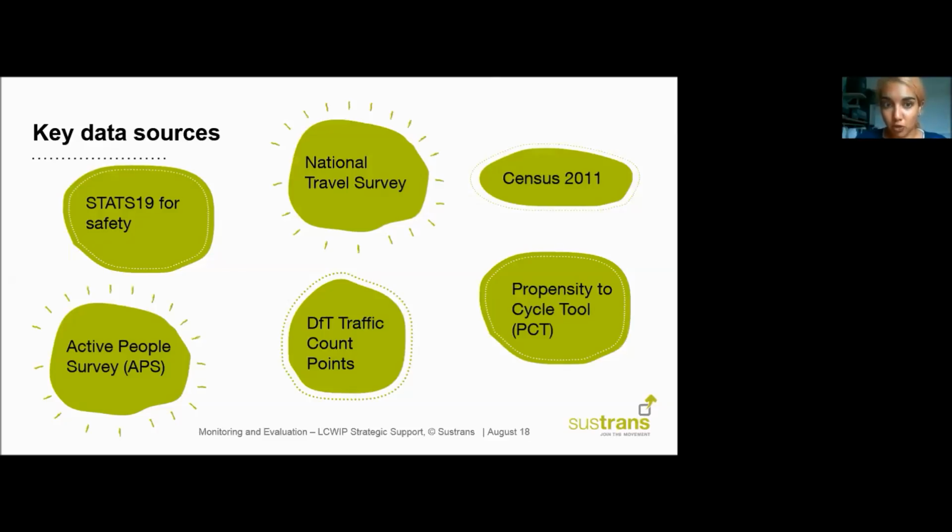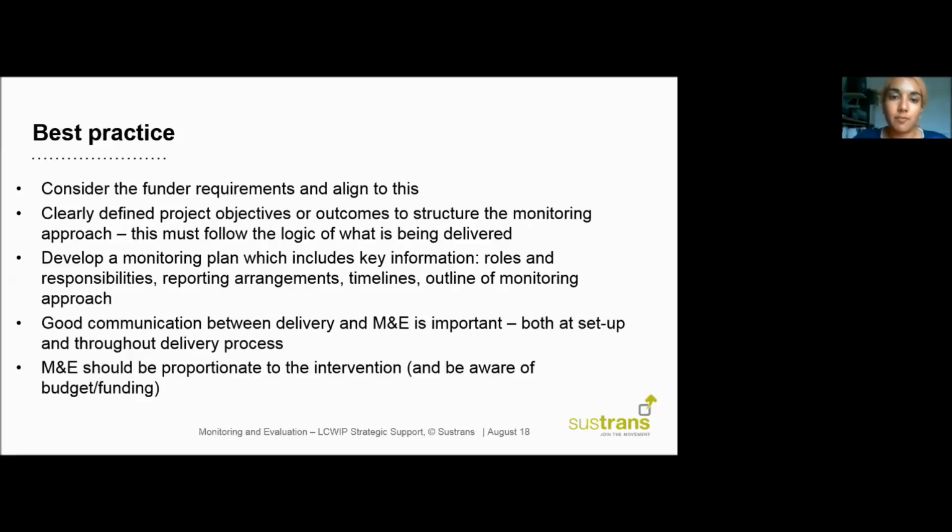In terms of best practice when designing a monitoring and evaluation approach, there are a few pointers. As I mentioned at the start, one of the main reasons why monitoring and evaluation is needed is because it's a funder requirement. So it's important to understand specifically what the funder requirements are, including their reporting requirements. The reporting requirements and deadlines will dictate by when the data needs to be collected and processed for any reporting. So in terms of timelines, understanding funder requirements is incredibly important.